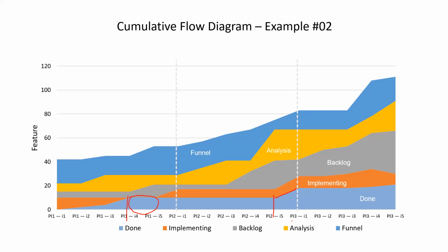Right? Are you good? Yes. Yes. So now, are you getting an idea of how, by looking at the cumulative flow diagram, we are able to analyze or figure out where the flow is getting stuck? The cumulative flow diagram is explicitly helpful to figure out where the flow of issues is getting stuck or might get stuck.